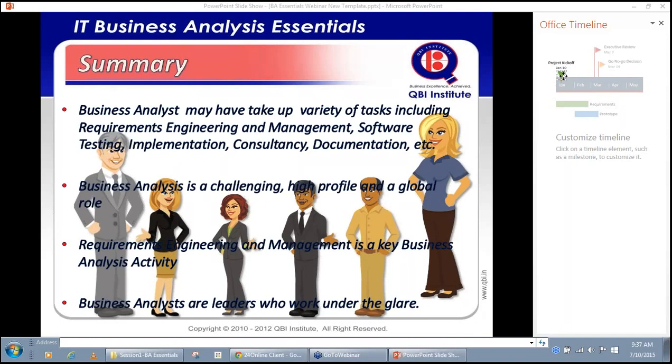Second, when the stakeholders are located at a distance, there is scope for misinterpretation or miscommunication. That scope for ambiguity is removed if you are, number one, very particular in your communication, that is, you do not delay the minutes of meetings and requirement artifacts after your requirement session, and you follow absolutely standard methodologies like UML and BPMN.